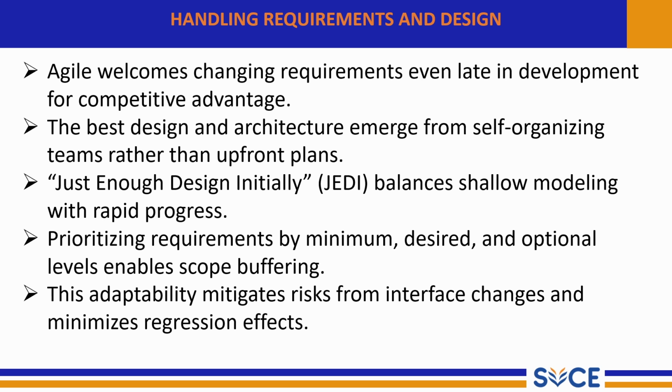Just enough design initially, that is JEDI, balances shallow modeling with rapid progress. This principle means doing only the minimum necessary design at the beginning, just enough to start development. More design improvements can be added as the product evolves. This avoids over planning and keeps development moving quickly.